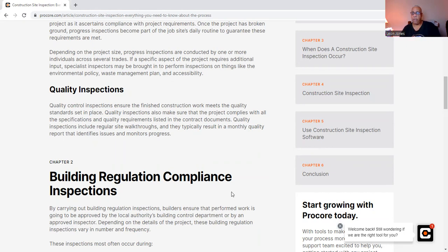Generally, when you're out in the field, you have what we call a daily report. The daily report talks about what activities have been completed by the contractor, where they've been completed, how much material did they put down. Now, it is the job of an inspector, particularly if the contract is what we call a unit cost contract.